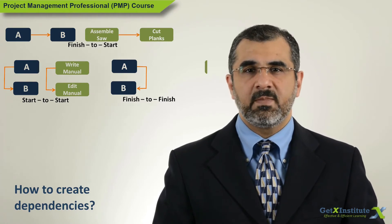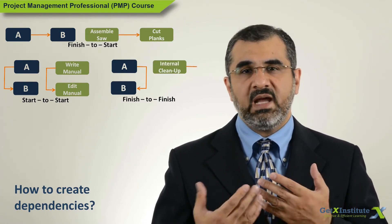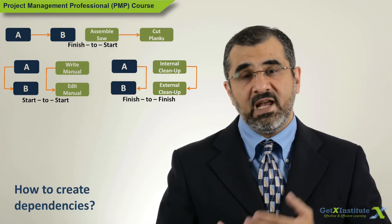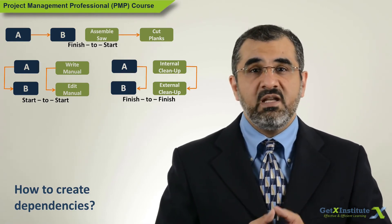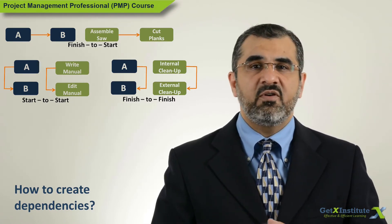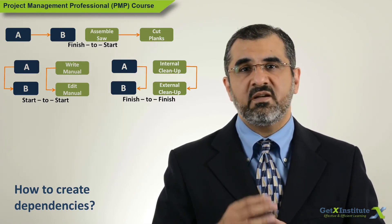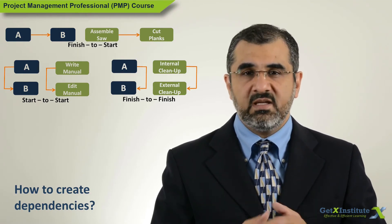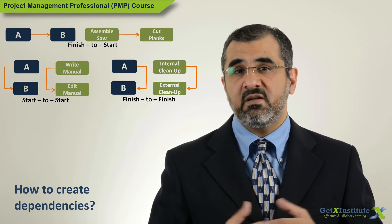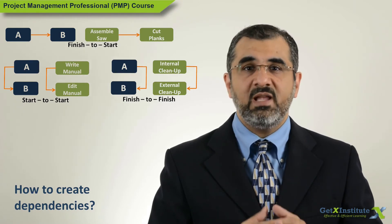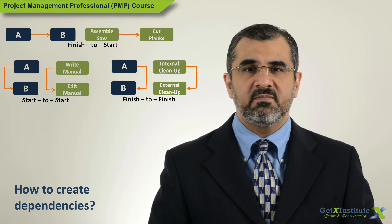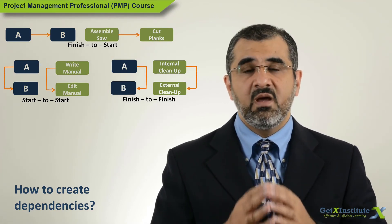Here is an example: two activities — internal cleanup and external cleanup. The project manager puts the dependency as finish internal cleanup, then finish external cleanup. External cleanup can be done in parallel, before, or after. If done before or in parallel, it will not be considered complete as long as internal cleanup is incomplete. Maybe there will be no work under external cleanup after internal cleanup is done, but it is possible that while the building is internally cleaned, some material may end up externally and will need to be cleaned. So this relationship will cover for that.